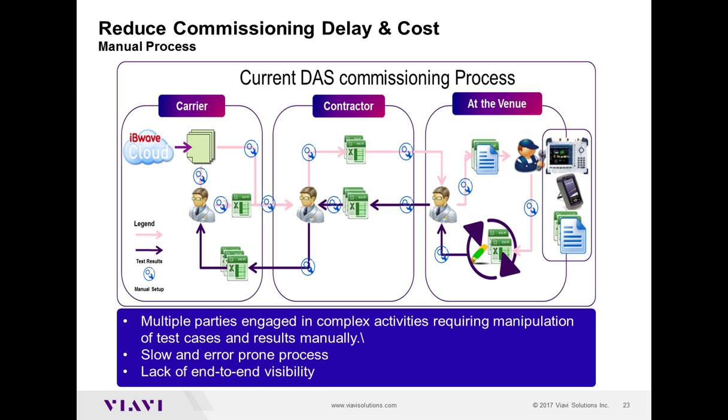So like I said, from a design tool, a design engineer takes that information, generates this Excel spreadsheet, sends it to the contractor who actually reviews it, works with the venue people, works with the cell site technician, the technician at the site, the construction crew, and basically that document and the spreadsheet is used to validate each and every cable based on the design and specification.